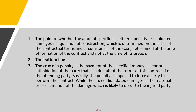Another difference: whether the specified amount is a penalty or liquidated damages is a question of construction, determined on the basis of contractual terms and circumstances at the time of formation of the contract, not at the time of its breach. The crux of penalty is repayment of the specified money as fear or intimidation of the defaulting party — penalty is imposed to force a party to perform the contract.